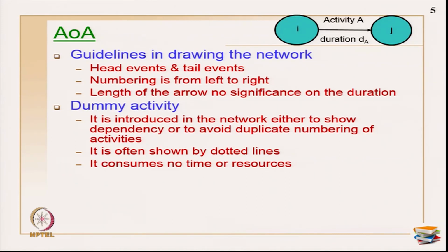These are the two reasons. In the examples which I am covering, I will show both examples, where the dummies are coming in and what is the purpose of the same. Dummies are often shown by dotted lines. It is easy to identify. It consumes no time or resources.